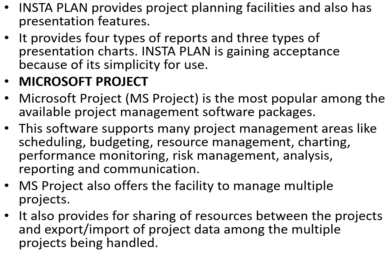Almost all tasks require resources for their completion. The simplest tasks often have only project team members for a specified period of time, but there is still a resource that needs to be available and managed in order to complete the task. The most sophisticated project management information systems can utilize components such as resource calendars, which specify when resources are available, and resource breakdown structures that specify the hierarchical matrix of resources, which can be chosen from the coordinated and from other projects.